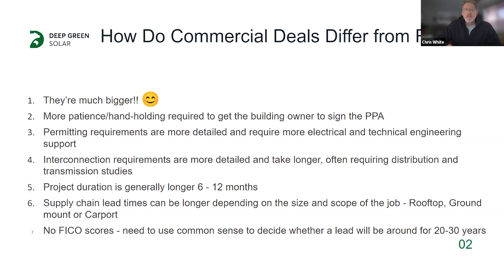Making sure you have supply chain available or that can be brought to the project on a timely basis. If it's a business with requirements about when you can access the rooftop, or if it's a carport, you need to time and schedule the project around the business hours of operation. These are things we do all the time and are happy to work with you on, and from a financing perspective can help move the projects forward in a timely basis.